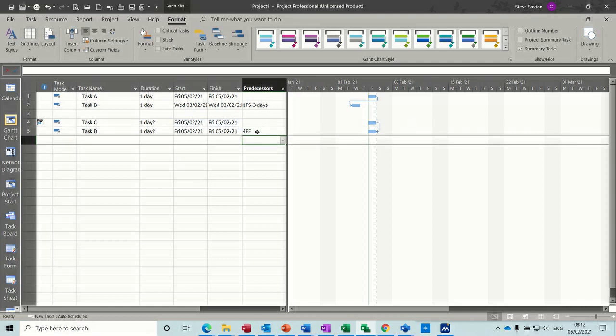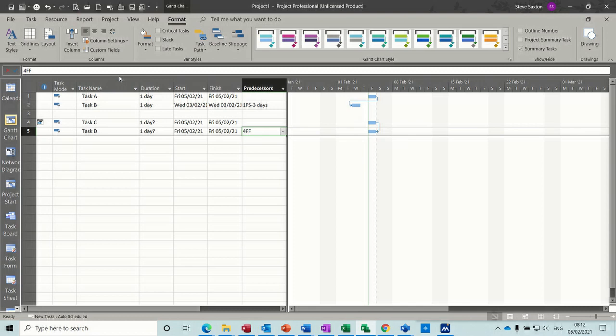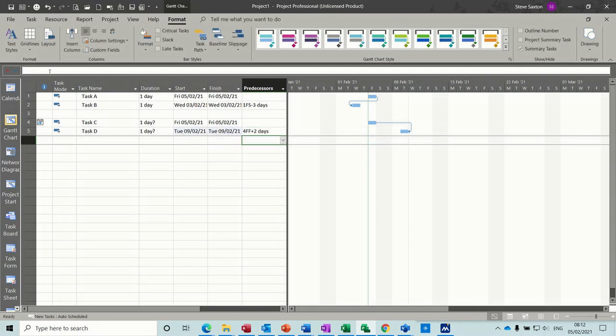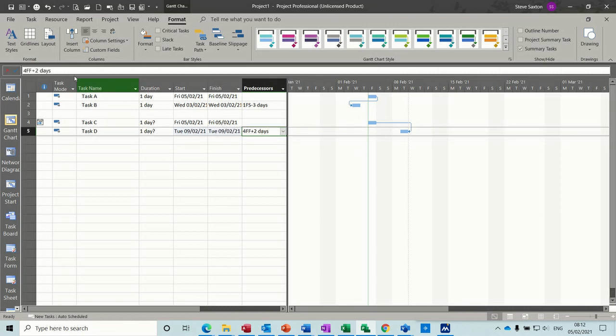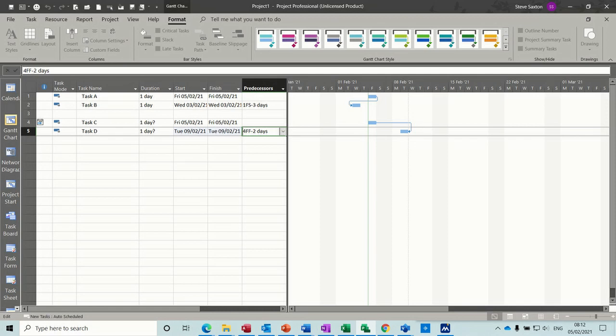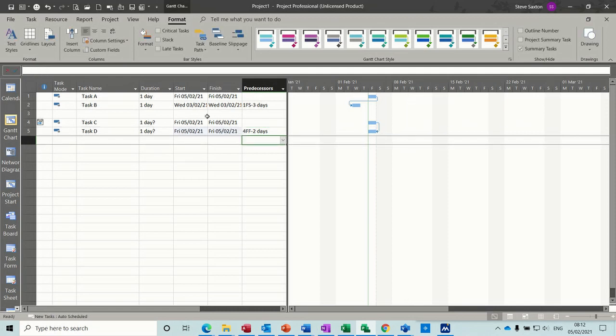So if I want to add a delay, a lag, I'm going to put a plus number on that, plus 2 days. If I want a lead, it's a minus number, minus 2 days.